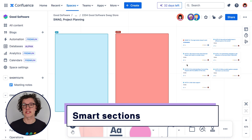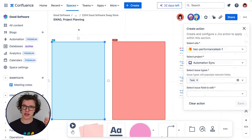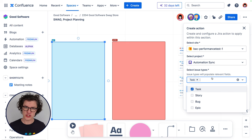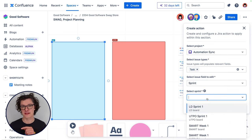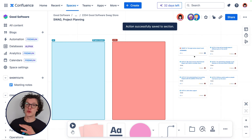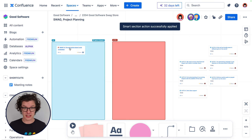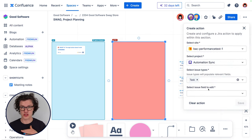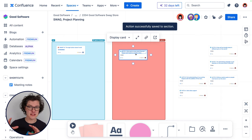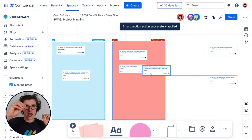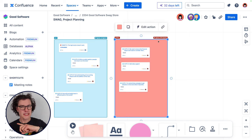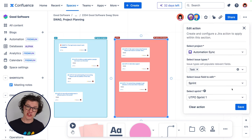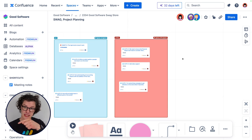So now when I move a Jira issue into this panel, that value on that issue is automatically changed. I could have a second smart section for setting the value for another sprint, so my team can easily work together to plan out the work to take on now versus later. As a past scrum master, I love the idea of building a whiteboard that's like this crazy interactive planning control board for Jira, specialized for exactly the way my team wants to collaborate. You can clear or delete actions on a section, but that won't undo the change that was made in Jira — you'll need to go into the Jira issue to make that change. Also, if you move a Jira issue into a smart section and then hit undo, that will move the issue out of the smart section but will not change that value in Jira.